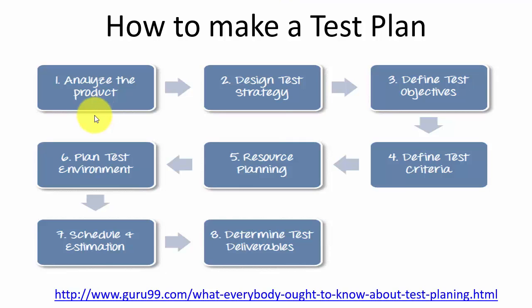So here we see some things that you need to consider when you are making the test plan. So of course you should always start to analyze the product in order to figure out how your product is going to be tested. And then based on that, design a test strategy. And of course define the goal with the testing. What is the purpose of the testing of this software system? And then plan the test environment, the resource planning, who is going to test the system,